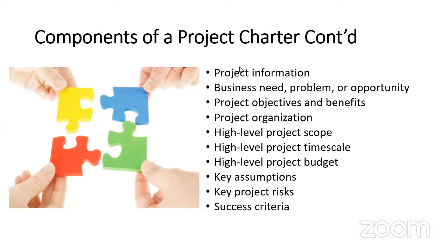If you look at what we have here, there is no project that doesn't have all of this. You have your project information, your project need or the problem identified, the objectives, the organization performing it and information about the organization. Then you have your high-level scope, high-level timescale, your budget, then key assumptions.